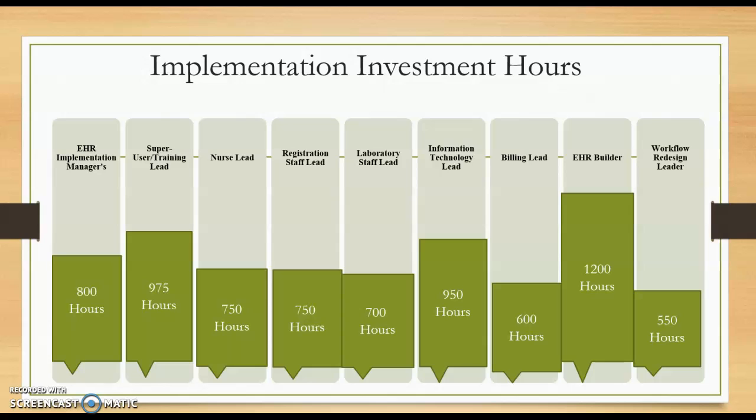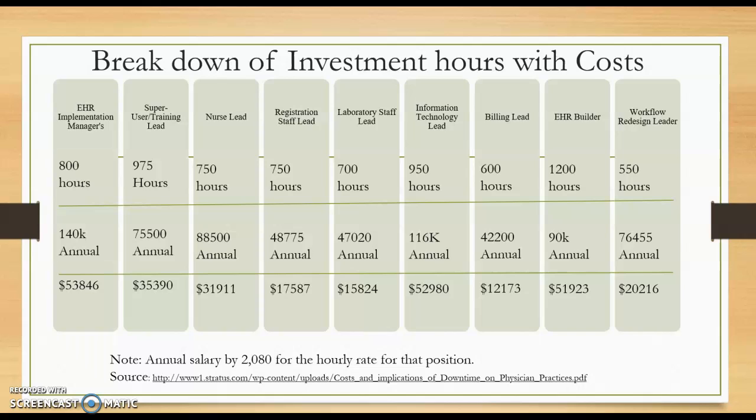Here we can see some of our breakdown for implementation investment hours along with our implementation team members. EHR implementation managers would require 800 hours. Super user training lead will require 975 hours. Nurse lead 750 hours. Registration staff lead 750 hours. Laboratory staff lead 700 hours. Information technology lead 950 hours. Billing lead 600 hours. EHR builder 1200 hours. And workforce redesign leader with 550 hours.